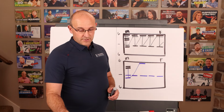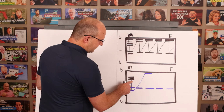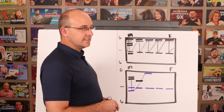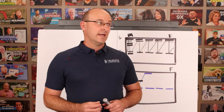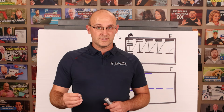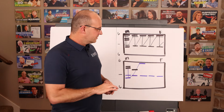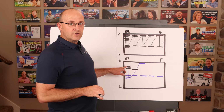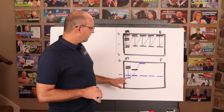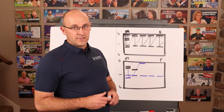Now, there are some other meetings that you're a part of on a weekly basis that we need to talk about. So I like to do the strategic planning and procurement meeting and the look ahead meeting before the OAC on the project. The OAC is the owner, architect, contractor meeting, and I know there's all kinds of different agendas for this, but the main purpose is to solve problems for the project from the owner's, architects, and contractor standpoint, and to build that team and to build trust. So I like to come into that meeting knowing who's covering, knowing what our plan is, knowing our procurement, knowing our problems, knowing our look ahead, knowing our weekly work plan, and making sure that I'm ready to go in there with solid data for the week so that I can wow the owners.